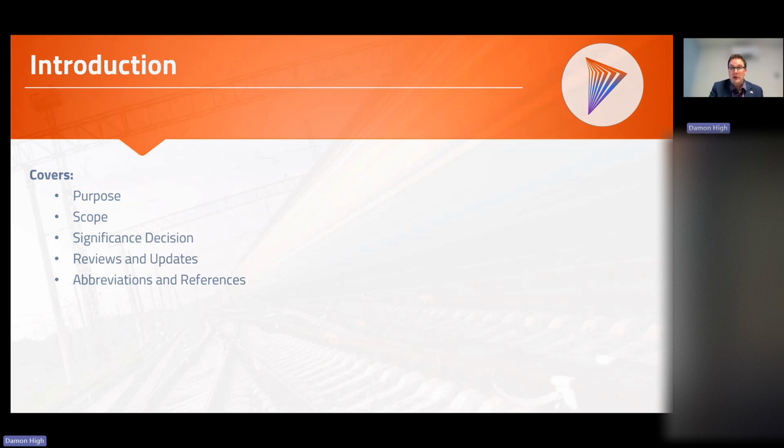And then we also need to appoint either an assessment body from UK terminology or an independent safety assessor from Canadian terminology. So it's really good to just capture in this safety plan what the output of that significance decision was, because then we know fairly early on from reading this document whether or not we need to appoint an assessment body or an ISA. Or if one has already been appointed, we can then just also capture here that the project has been deemed significant under this application number. We have therefore also appointed company X to be our independent safety assessor, etc.